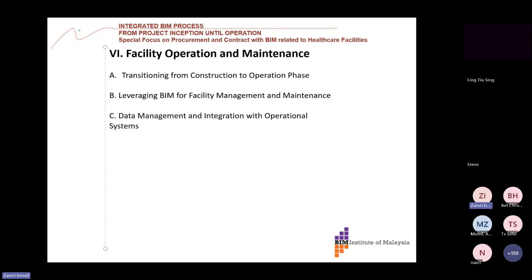All right. Okay, in terms of the final stage, facility operation and maintenance, the transition from construction to operation can be very smooth, because whatever you construct, you have constructed again virtually in the 3D model with all the information: the warranty, the manufacturer, the actual material, the manual to maintain, and you hand it over to the operation and maintenance team. So they can use that. As one of the projects that I will show as an example,